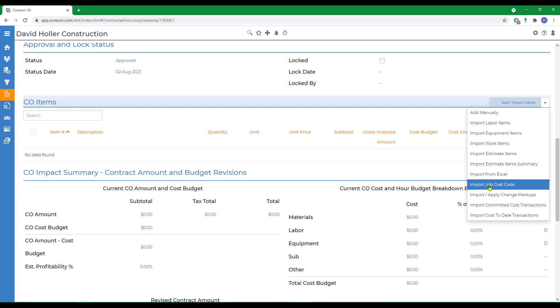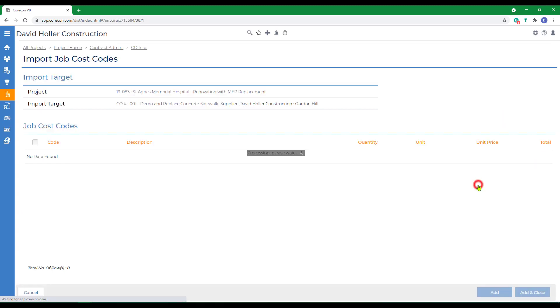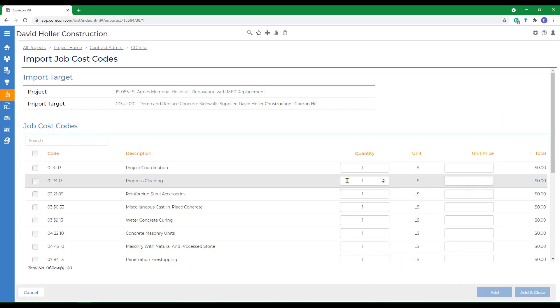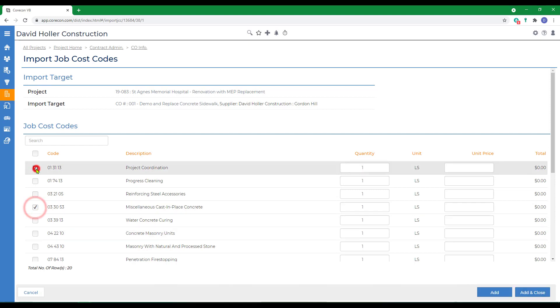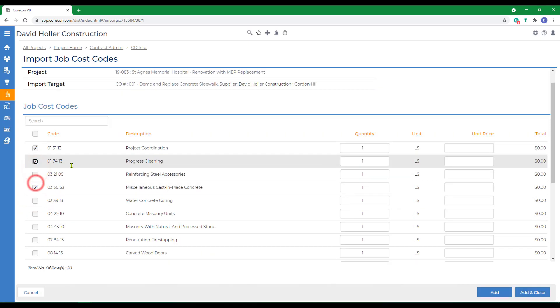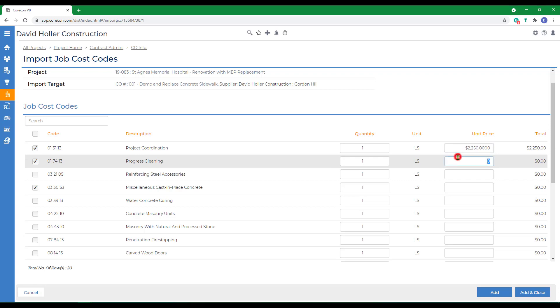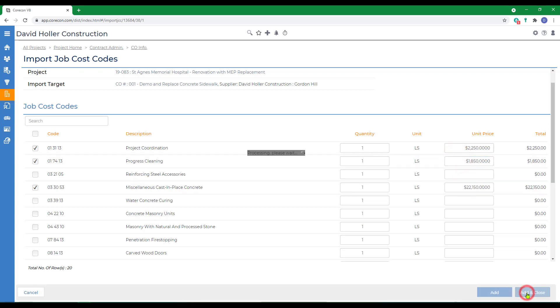Let's add our first change order item by importing from job cost codes. We're just going to need three items, and we're going to go ahead and enter the unit price. This would be the amount including markup, profit, overhead, or fee, and we're going to make this lump sum. Click Add and Close.